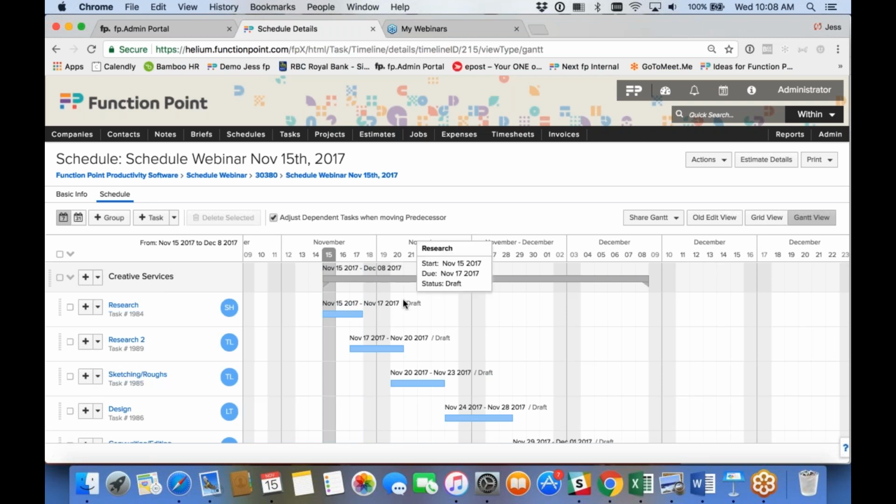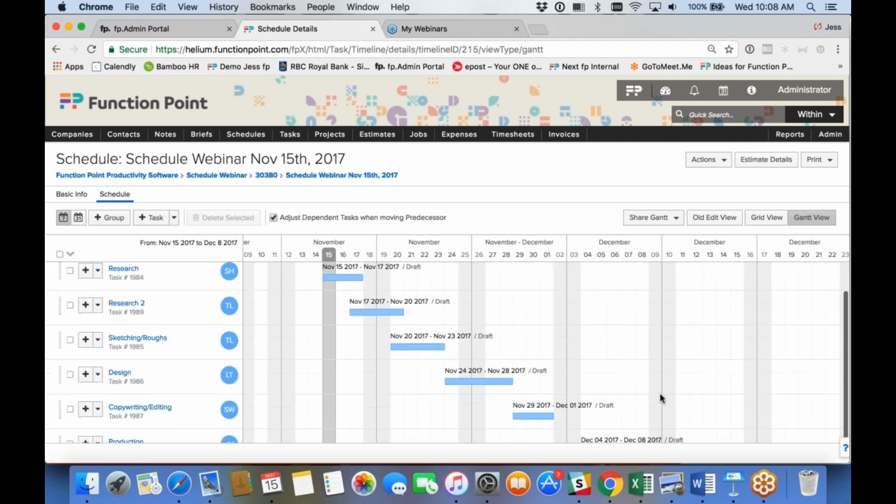So, for example, if we change this first one into assigned status, and we make the following ones subsequently listed in the schedule dependent, once this individual has completed their task, it will automatically trigger the next dependent task in line to move into the assigned status. This is beneficial so that people are not inundated with a bunch of assigned tasks in their tasks and to-dos panel and feeling overwhelmed that they have a lot of work when really it's just a difference of dates.